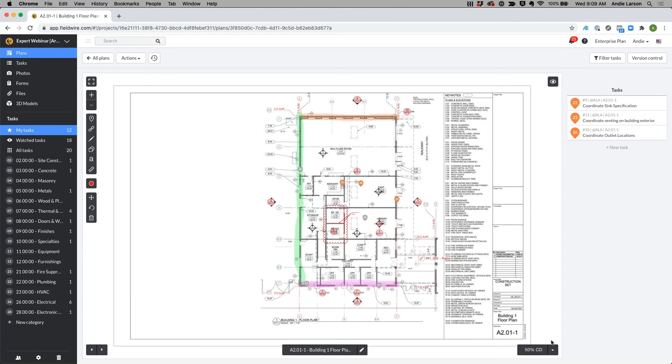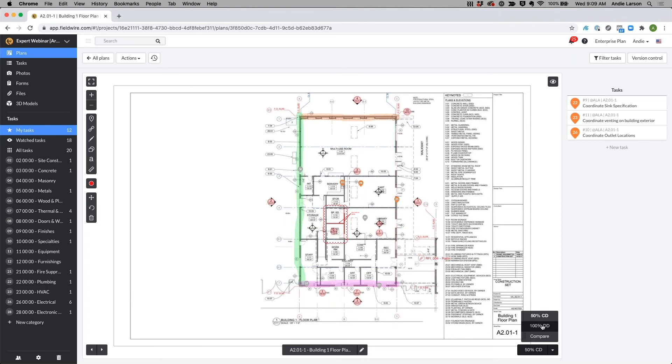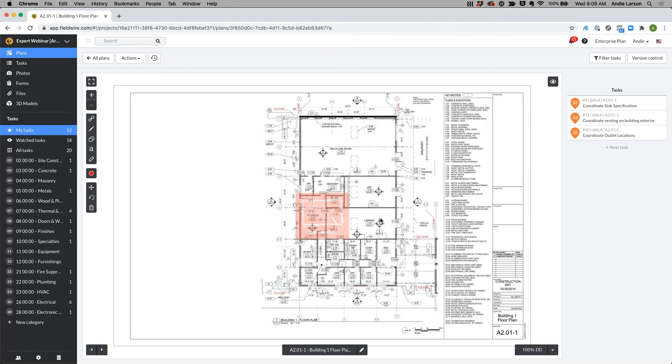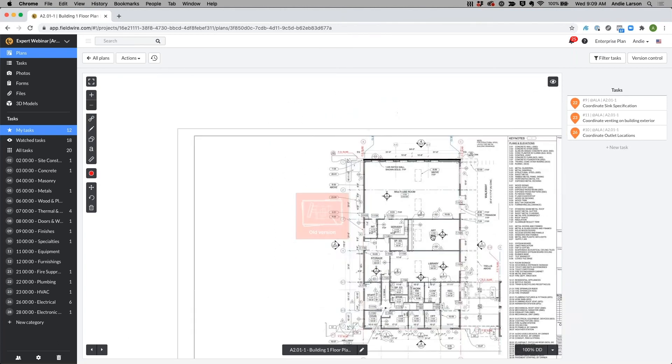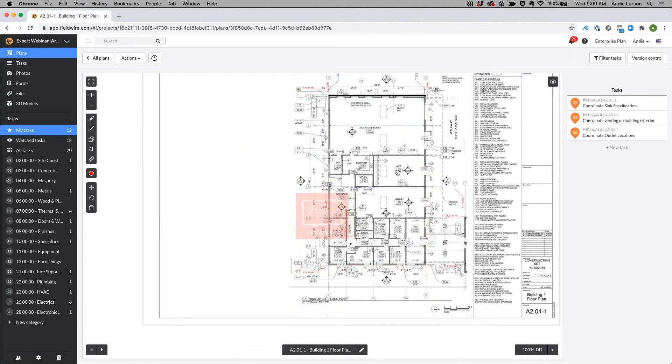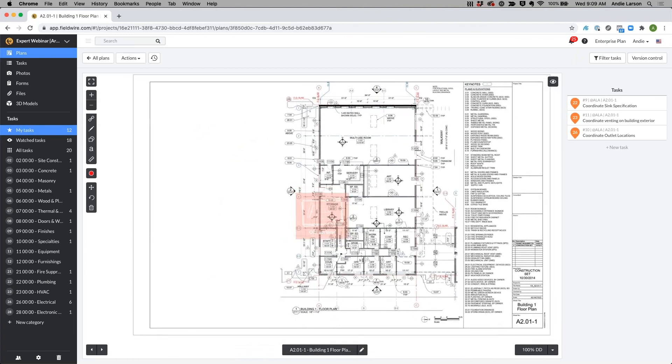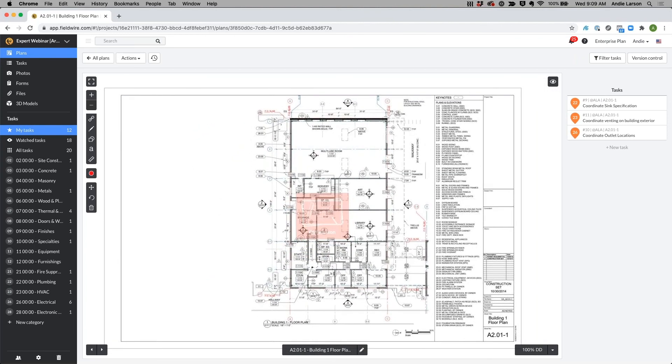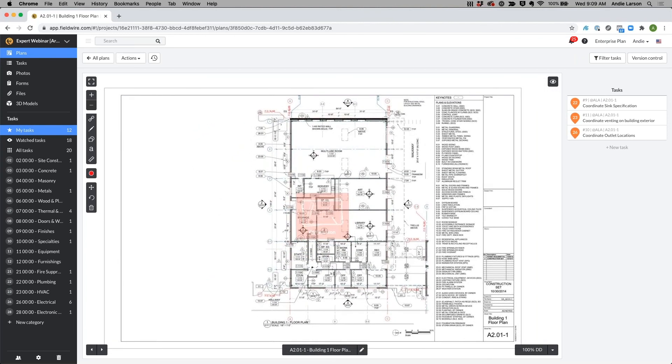Down here you can see that my most current version is this 50 percent CD, but I can go back and check and reference my 100 percent DD and above. If I do want to go back and reference exactly what had changed, I could go to my 100 percent DD set and you'll note that this watermark follows you around the whole time to make sure that all consultants and everyone collaborating in the design knows that this is outdated and only for reference.